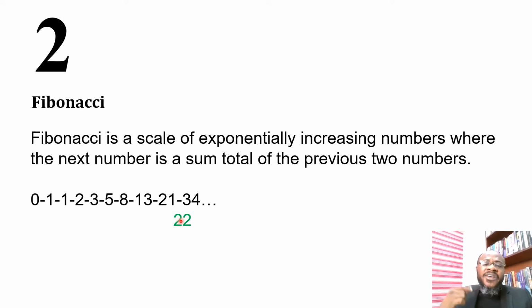But this time around, the perceived difference is not the same. People will not perceive the difference between 22 and 21 as twice the size of the previous number. No, in fact, they are very close. As a matter of fact, people would perceive them as virtually the same in terms of the complexity. Okay, so there is a bit of confusion there, and it will be difficult for people to determine the differences between the two user stories in terms of its complexity.